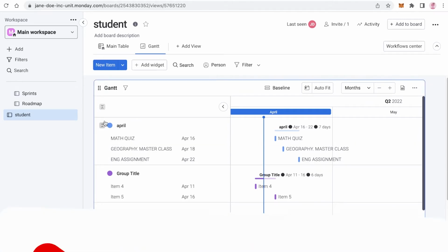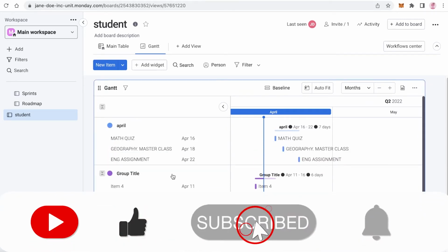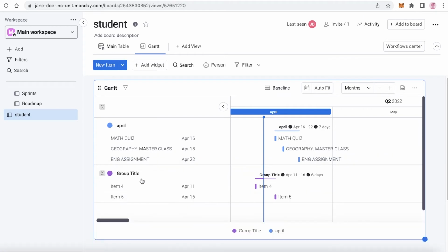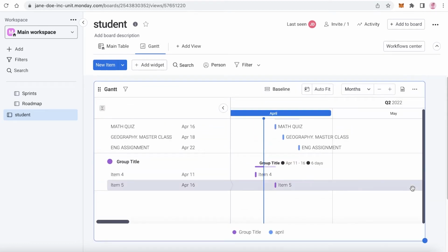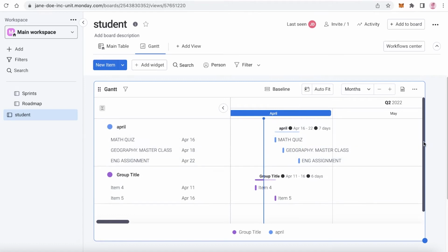You can see the first section is marked by one little section, and then you have the second section. If you have certain tasks that are all assigned to one person, you can label them in one section and have them appear over here, then the next person below that, and the next person below that. You can group things by the assignee, and then have a progress bar of how much each person is working and how much productivity each person has.